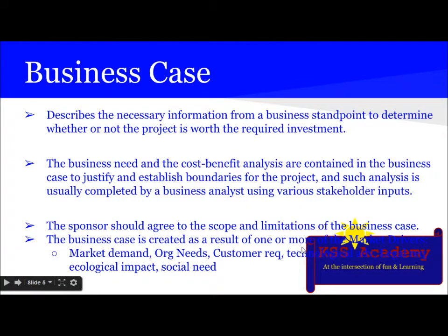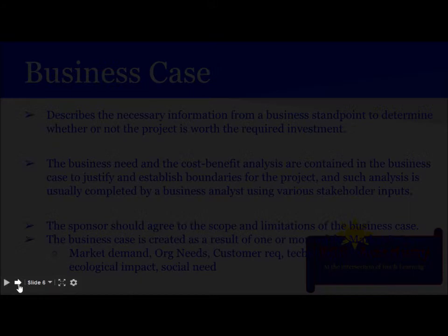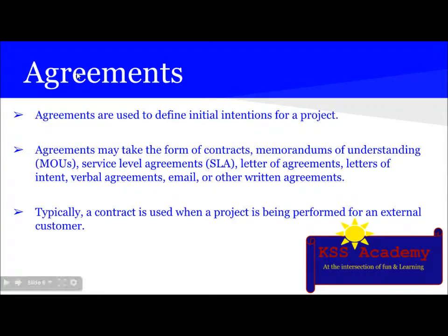Business case is created as a result of one or more of the market drivers. What are market drivers? Market demand, organizational need, customer requirement, technological advance, legal requirement, ecological impact, and social need. Next input is agreements. What are agreements? Agreements are used to define initial intention of the project.